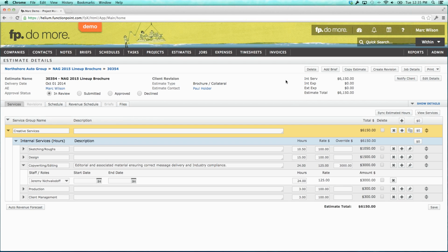So I guess just to recap, thank you very much for that, Emma. Just to recap, it's a one-way street from schedule to estimates, and you do need to choose to sync that. If you're going in and making adjustments to the estimates, first you'll need to go in and manually update the schedule, or you can just go to the schedule and make the changes there.